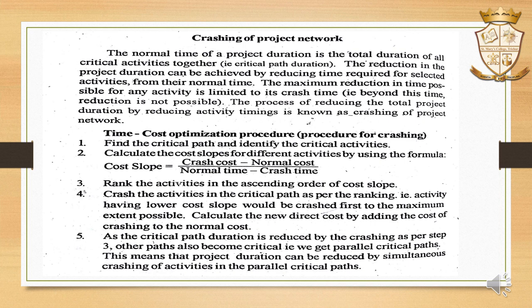Then fifth step: as the critical path duration is reduced by crashing as per the previous step, other paths also become critical. That is, we get a parallel critical path. This means that the project duration can be reduced by simultaneously crashing activities in the parallel critical paths.